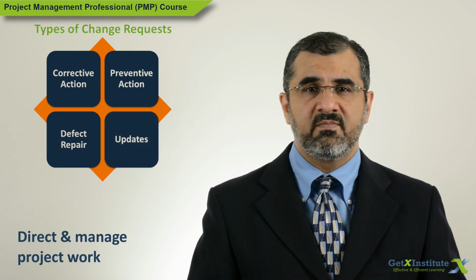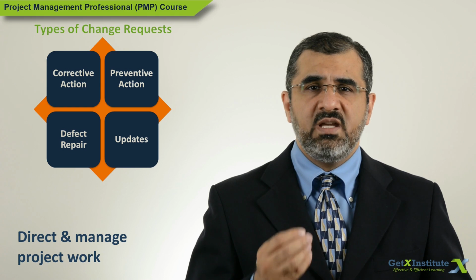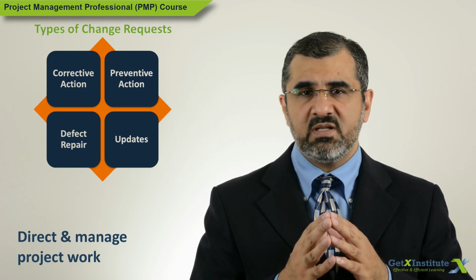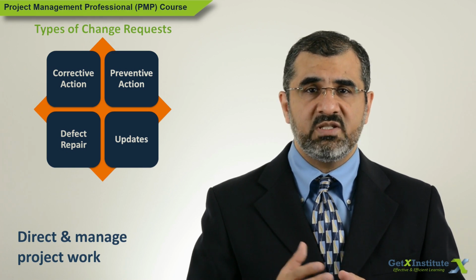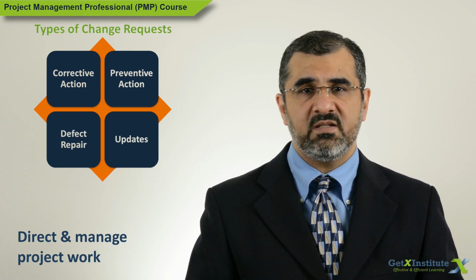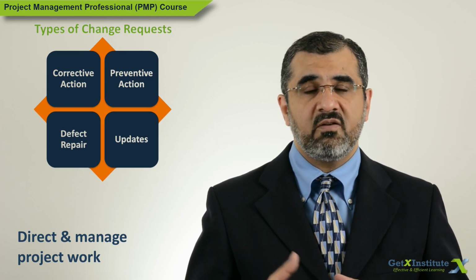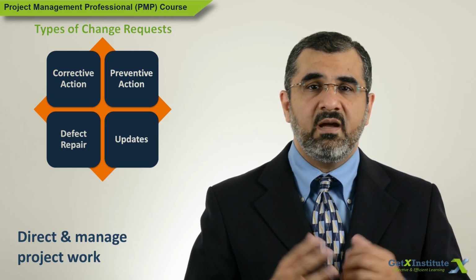Updates only. Sometimes a change to control documents is needed. Control documents are those that are protected from a change without proper authorization. So a change request can be put up if a protected document needs an update.